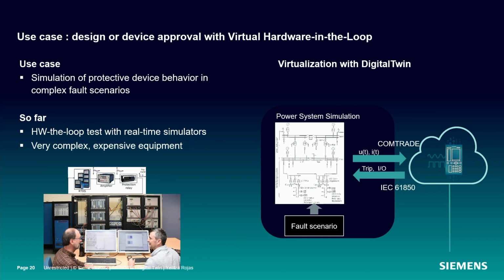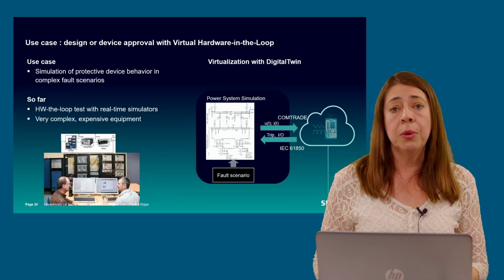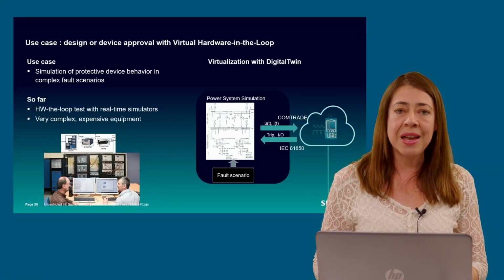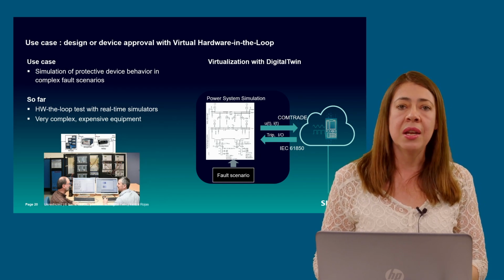In such a way, the complete conventional testing can be replicated in a virtual environment, which significantly simplifies and speeds up the process. This test procedure can be run in an early stage of the project, reducing the time pressure normally experienced during the commissioning and energization.